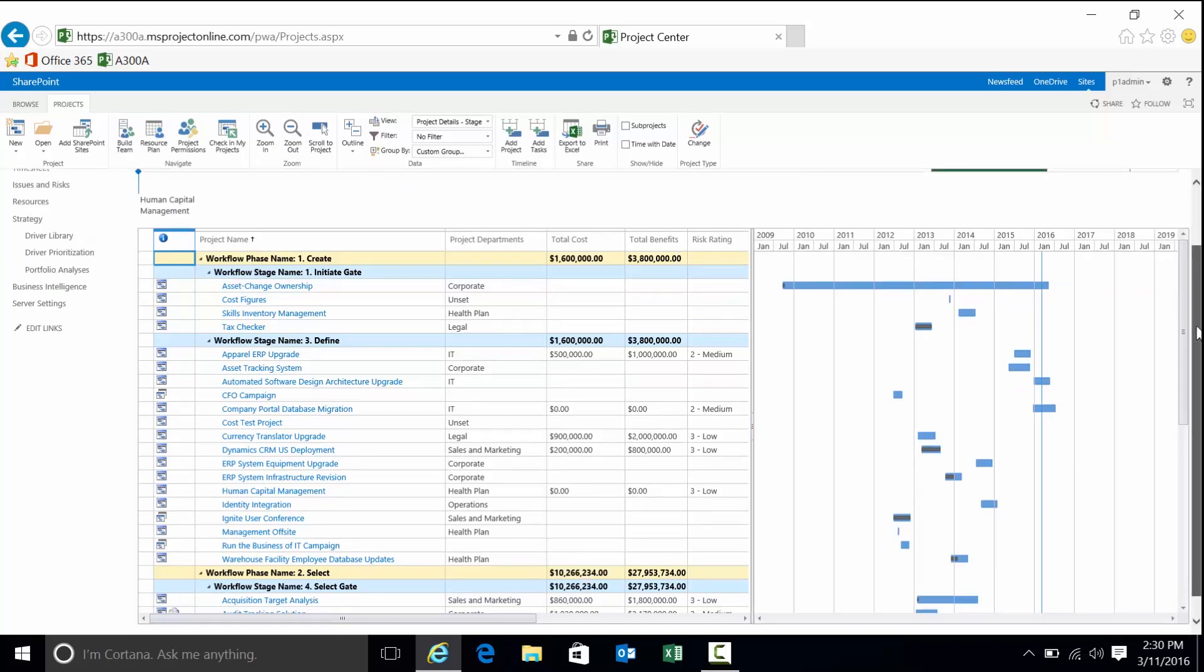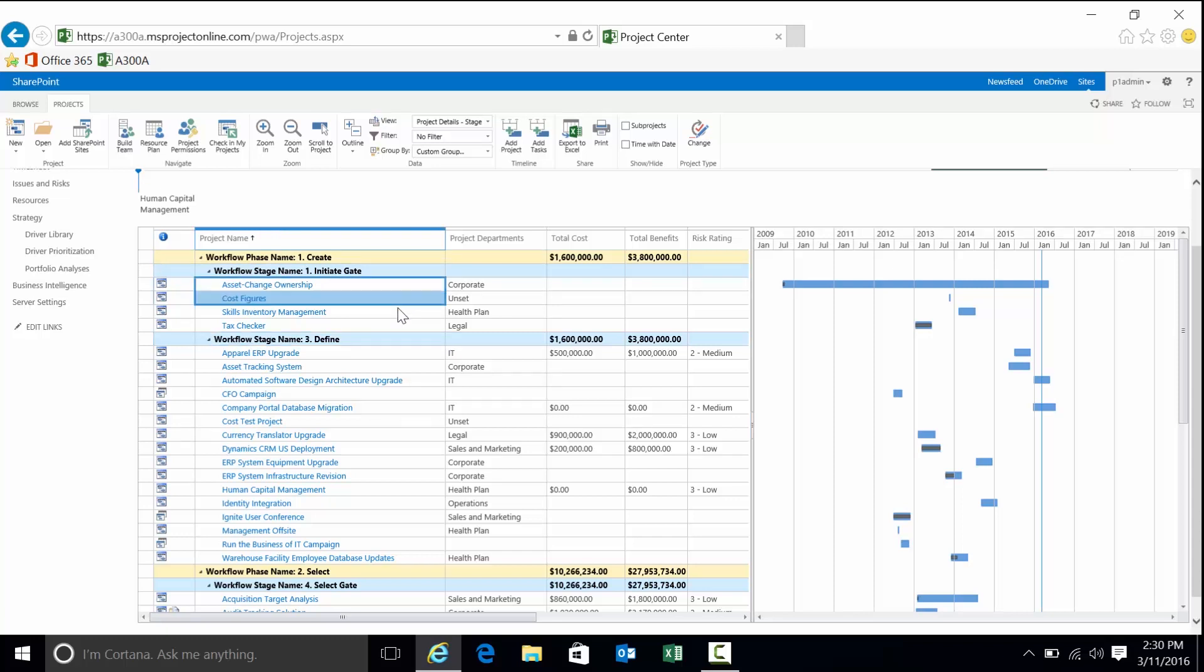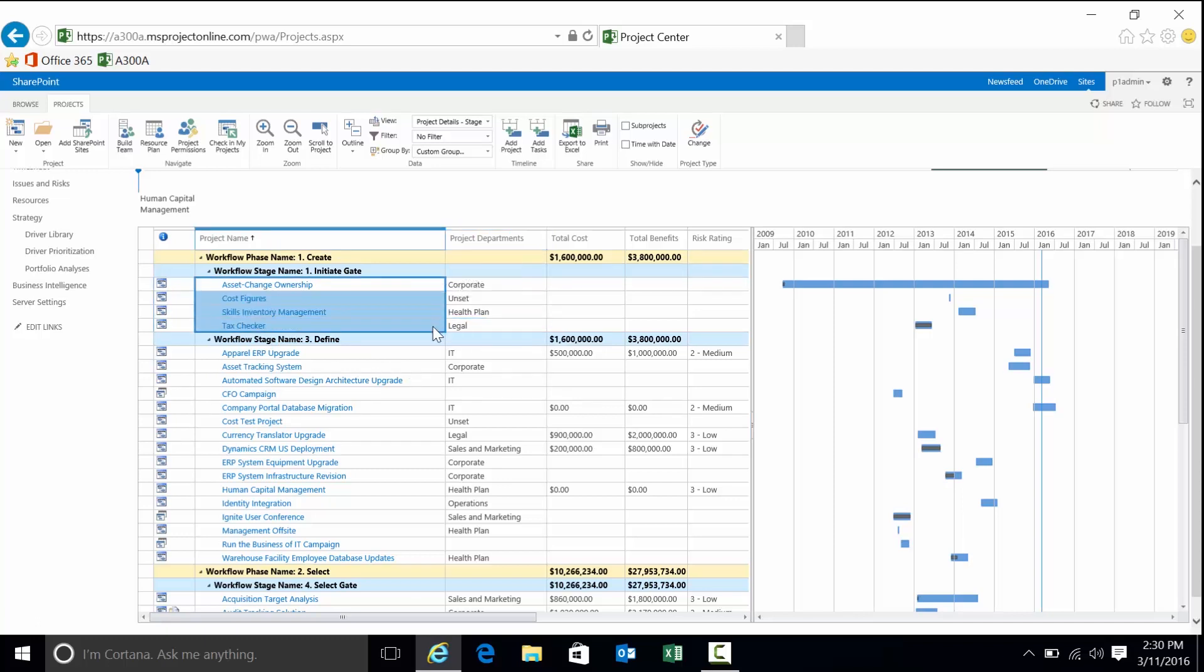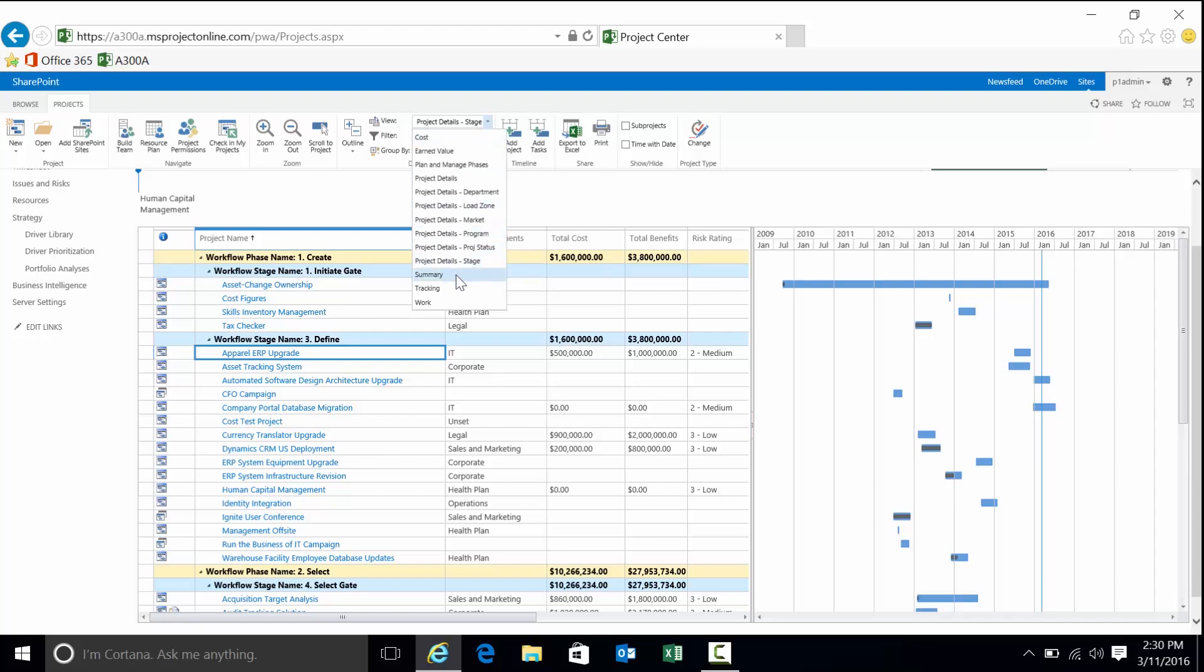This is a view that shows all the projects within the system with regard to a customer's methodology. Create governance phase. Within create, we have two steps, initiate and define. Initiate would be a request entered into the system. We don't know if we want to pursue it yet, but it's a request we have to consider. Something that's defined is something that's been approved for further definition.